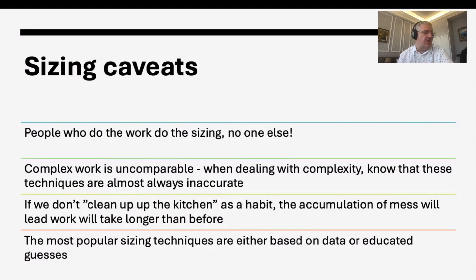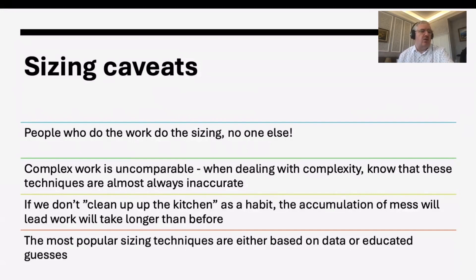A few caveats first: the people who do the work should do the sizing — nobody else. With complex work, as Dave Snowden discussed, it's incomparable to what you've done before, so it's difficult to size. Also, if you leave a mess behind — technical debt, though it's only debt if you plan to pay it back — that will catch up and affect your sizing and forecasting. The most popular sizing techniques are based on data or educated guesses.